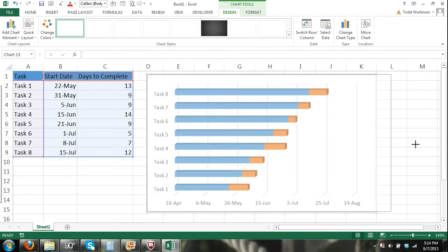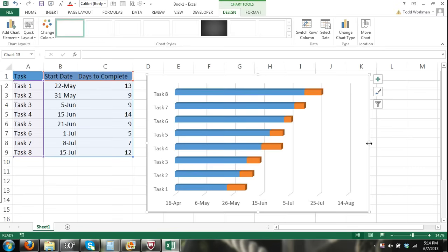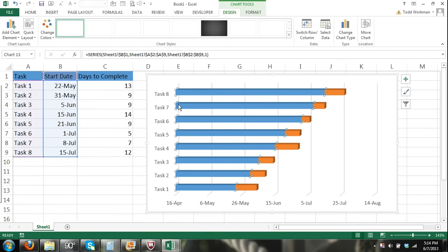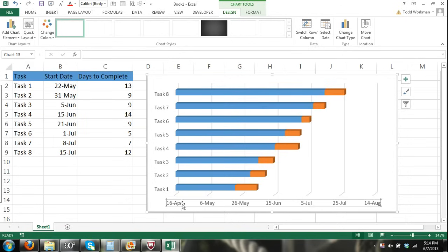We're on our way to having a Gantt chart. After resizing, you can see a couple of problems: the tasks are in reverse order, and we have blue bars representing the start date with a large gap — the chart bounds go all the way back to around April 16th, but our project doesn't start until May 22nd. We need to fix both of those issues.